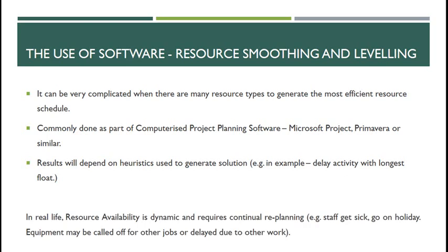And in real life, resource availability should be dynamic and requires continual replanning. We can plan at the start of the project, but it should be an ongoing iterative process, because people do get sick, people have holidays, equipment breaks, you get delays on other parts, and other dependencies have an impact. So you need to be effective.